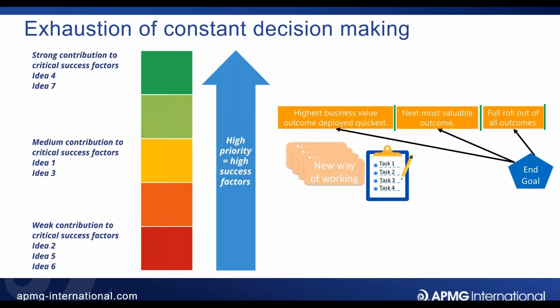And that means that I have to take that decision based on business value. So of course, I'm having to look at all of the benefits and the advantages and the improvements that each outcome will deliver, and then make a decision on, so we'll go with this one first. But when I get to the end and I've delivered that outcome, I have got an idea of what the next one should be, but I have to go back and revisit that decision because the world might have changed. So I have to go back and decide whether or not, based on new information, we've got the right thing, or do we have to change the order of things?